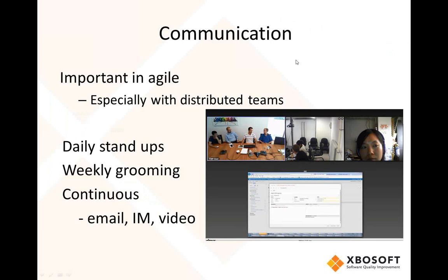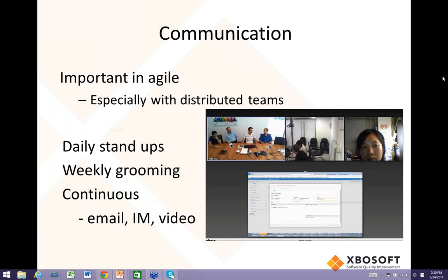Okay, we went to the next slide. Can you explain a bit on what we're seeing here? Yeah, that's a meeting. I think that's a grooming meeting. You see the developers in the Netherlands on the left. Exactly, because the first thing I want to ask is why is everyone sitting down? Yeah, because it's not a stand-up, right? I'm kidding. So grooming meetings tend to last for 1 hour or less. So we time box them. We say we've got 1 hour before the meeting itself. We say, we want to discuss these stories. If we only finish 8 out of the 10 stories, we stop there.